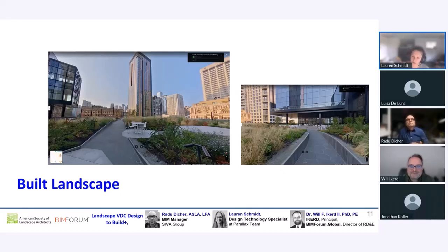And that we were able to carve out more of the typical 3 to 4 foot depth for those tree pits. I see. Basically, that was a big structural coordination point: we had to carve these out underneath. Yes. And a lot of mass put right at the top of a building in a seismic area. So a lot of interaction at play. Beautiful project. Yes, it was a big project, but it was fun to work on.